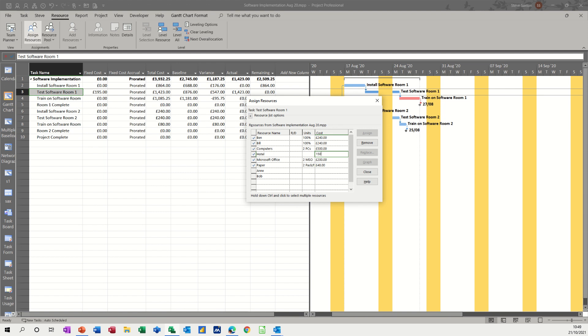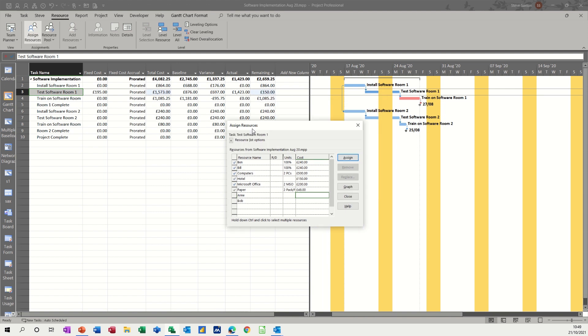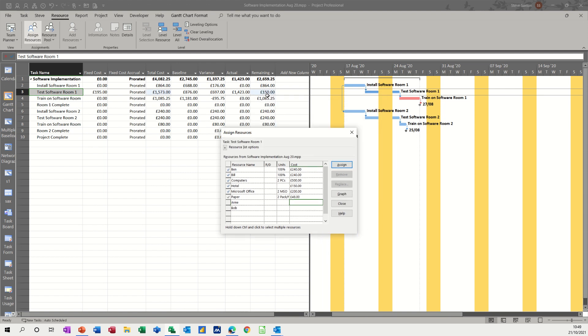You see it still says £150 remaining, even though this task is 100% complete, which is really irritating, because you wouldn't really want to see any figures in this remaining column, because it isn't. It's been used, this task is finished, it's spent. So that's why I do that, and then it gets spent.